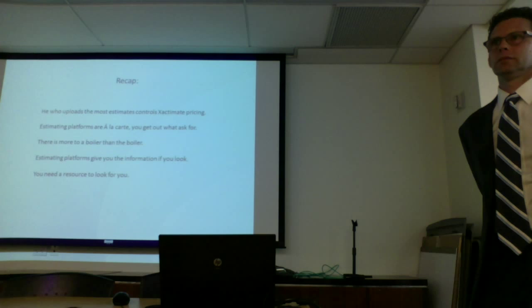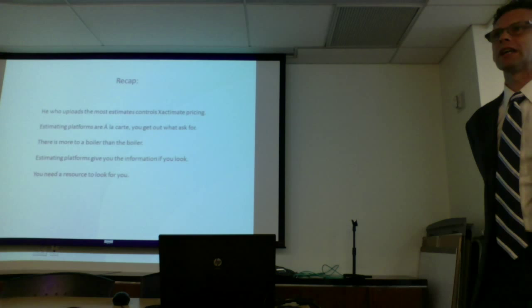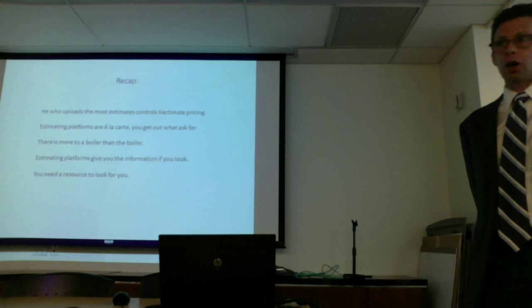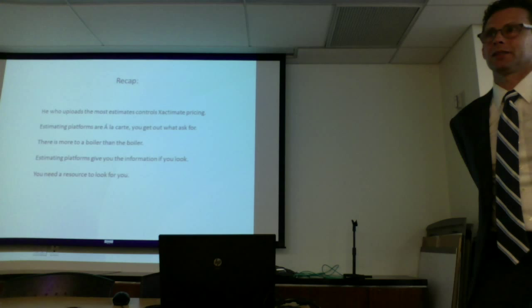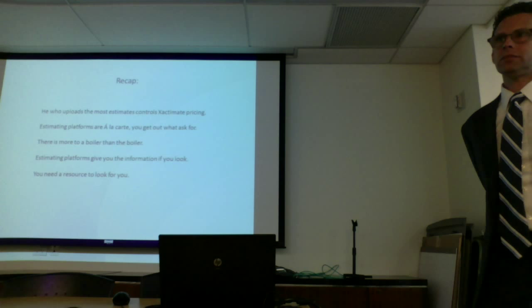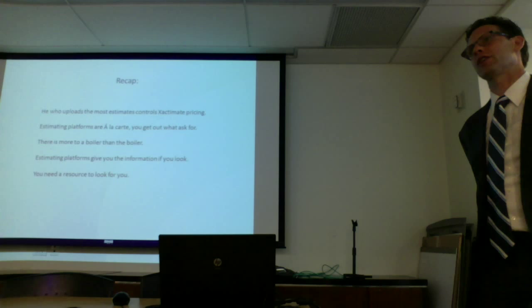I'm familiar with it. The Build It Back price, I think, is $169 or $160-some per square foot in the City of Long Beach. The actual replacement costs are over $300. The Build It Back number is not an accurate reflection of what it actually costs to build, not now, and not prior to Sandy. Even with the multiplier in the feasibility analysis, on top of the Dewberry report prices, I'm saying it's low.